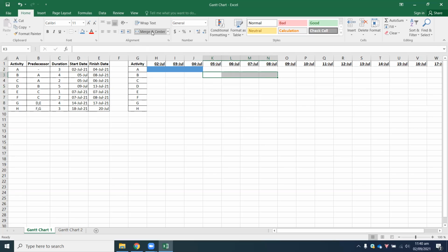Now, please do note this, just in case it mentions in the question that the weekdays is just considered as 5 days, so you will need to omit out the weekends. If it doesn't say whether a week is 5 days or 6 days or 7 days, so you will use it as 7.